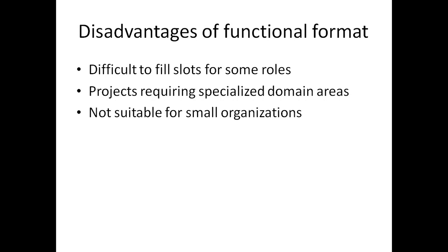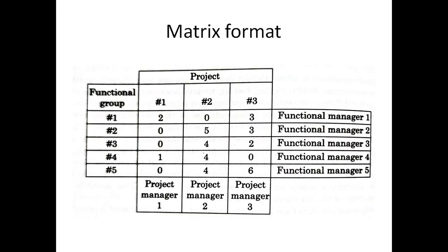And this functional format is not suitable for small organizations because a small organization will have only a limited number of projects. Then if we assign some designers for a particular project, after that design is over, that team will have no other work if there is no other project for that organization. So it is not suitable for small organizations. So these are the disadvantages of function format.